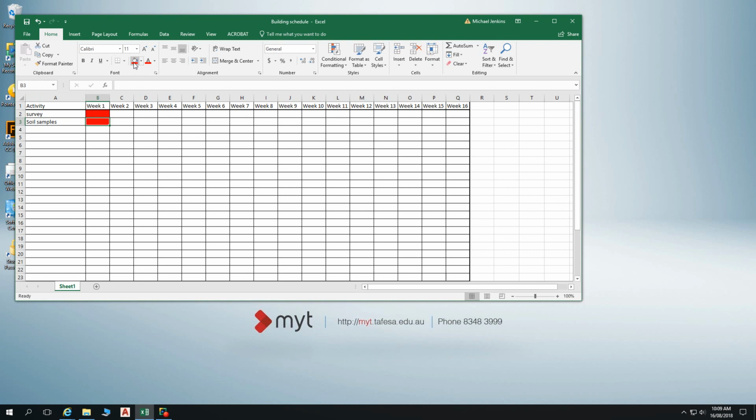Right. I'm going to say that's happening in that same week. We're going to be doing our site survey and our soil samples. Mark out where the house goes in that, so that you're getting soil samples following the footprint of the house. Yeah, do that in our site survey.